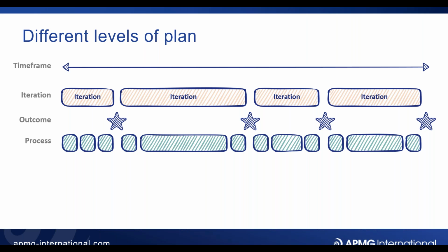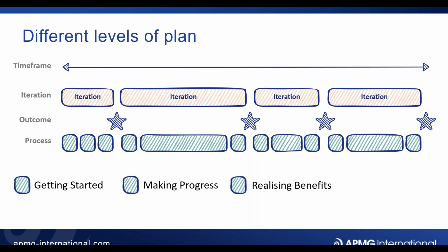And what we've identified is our big idea, the outcome of each of those iterations. And then, in order to make sure that I'm going to hit that milestone, that the outcome is going to occur on the time frame we said it would, what I've got is a very simple, repeatable process. 3 steps in the process under each iteration. They might take different times, but they're all there. So let's have a look. The first box is getting started. Getting started is doing things where we're actually going to prepare our information. Then we'll do making progress, where we actually get stuff done. And then we start to get ready to put it into live use and transfer it to be the new ways of working. And that enables us to achieve our milestone.